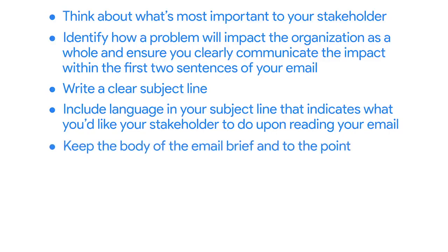And remember to also keep the body of the email brief and to the point. When communicating about a project problem to a busy senior stakeholder, your email should briefly outline the problem, explain how it might impact an organization's goals, and clearly state the decision you need from your stakeholder in order to proceed.